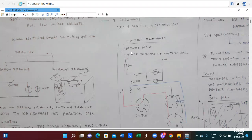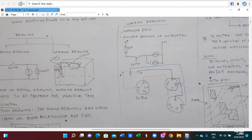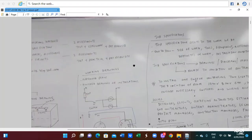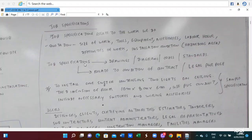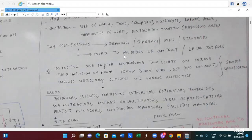There are two kinds of drawings. Before you begin any job, you have to provide a job specification. Job specifications are related to the work — depending on the size of the work, tools, equipment, accessories, labor hours, difficulty of the work, and the installation conditions and hazardous areas — those need to be provided in the quotation. The job specification is expressed by means of drawings, diagrams, codes, standards, and also the work conditions related to the contract and legal purpose.